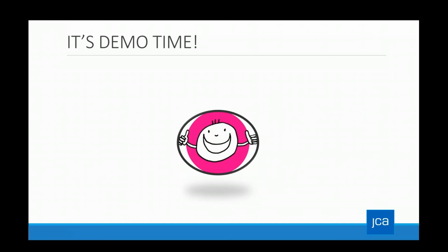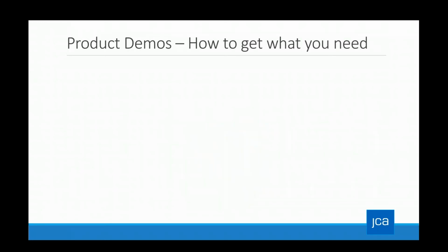Step 1 is the step of delivering demo scenarios to the vendors and asking them to stick to the script. Think about your top priorities and describe scenarios you want to see demonstrated by your vendors. Don't dictate how they should do something. Simply describe what it is you want to see. It's important to let the vendor show you how their system works, and you want to see the differences in how one system manages a scenario versus another.